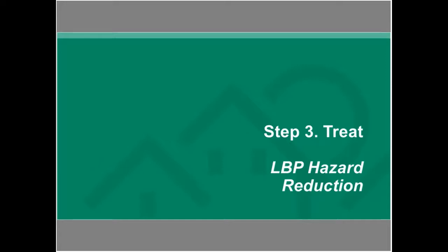Yeah, and then somebody was asking about a risk assessment. Would you really do a full risk assessment without knowing where the lead is? It makes more sense to conduct a paint inspection first. We were saying that if you presume all painted surfaces contain lead-based paint, an assessment can be conducted based on that assumption. So a paint inspection is preferred to pinpoint the locations.